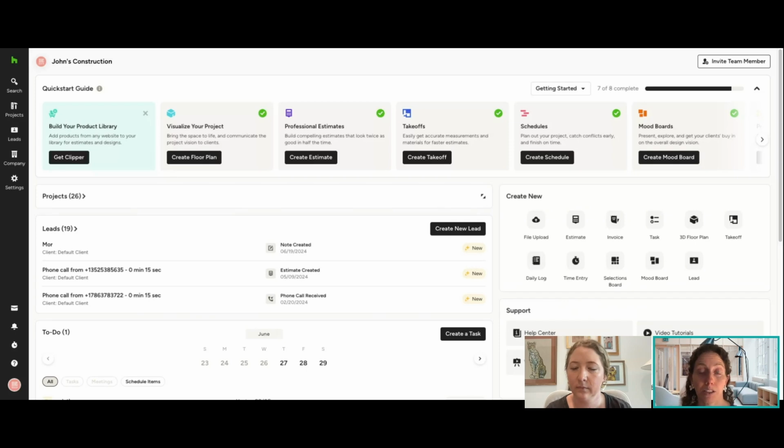But you do have some options for those fees. One, you can offset them to the client, so basically just have the client pay the fees, or you can choose to cover the fees yourself. Or a third option is that you can increase your markup and then embed the fees in there. We've seen that method be really successful, since that fee can sometimes turn off the clients if they maybe don't want to pay if it's a bigger amount. If you embed it in your markup, they don't see the fee and then you can be paid online, and it's just more convenient for everyone.